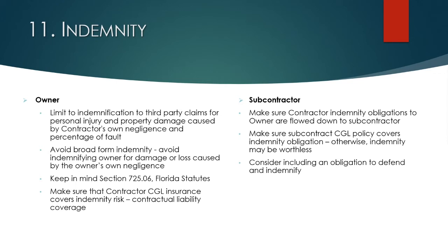The takeaway there is make sure that the subcontract requires your subcontractor to indemnify, defend, and hold you harmless from any of those types of claims. And again, make sure you're compatible with the requirements of 725.06 if you're asking that subcontractor to indemnify you for anything that you cause.